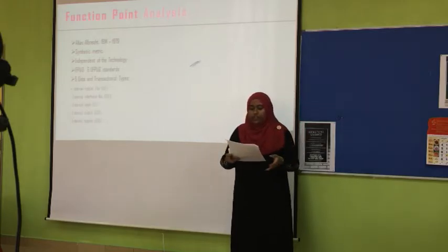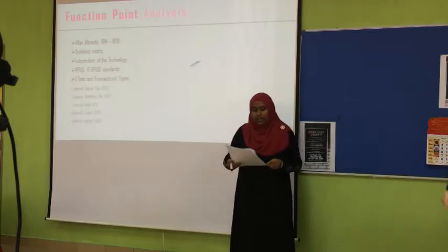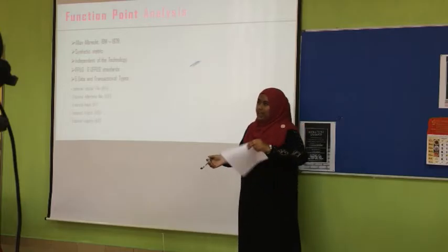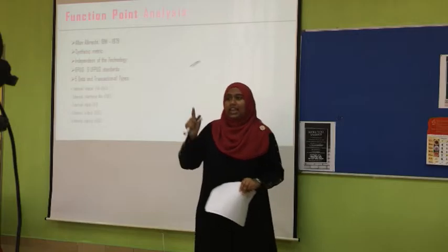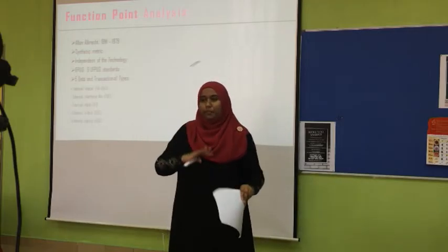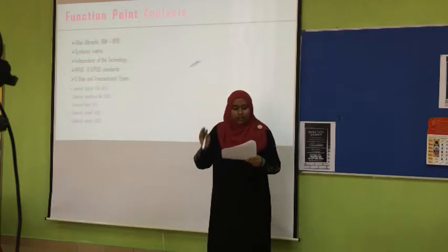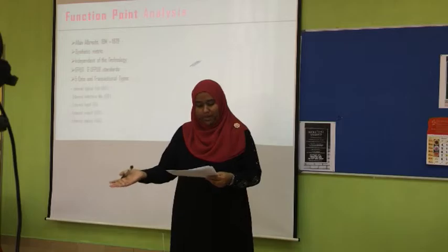Function point focuses on the functionality and complexity of an application. One good thing about function point analysis compared to the others is that it is independent of the technology, where functionality and technology are kept separate, so we can compare different applications that may or may not use different programming languages and technology platforms.